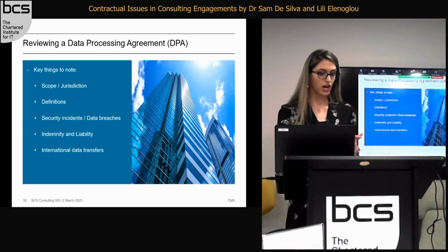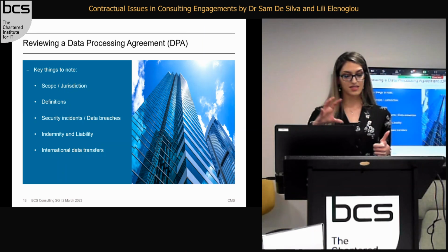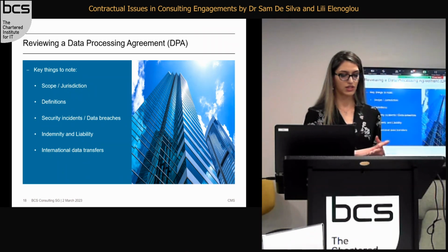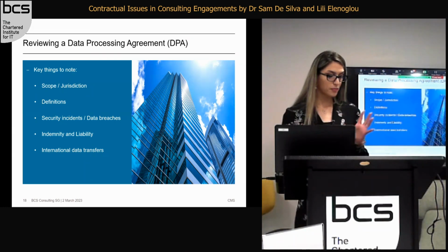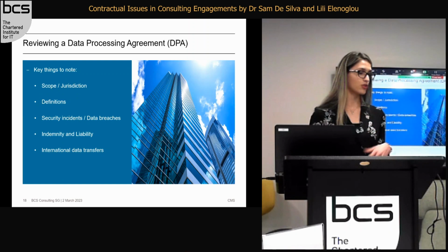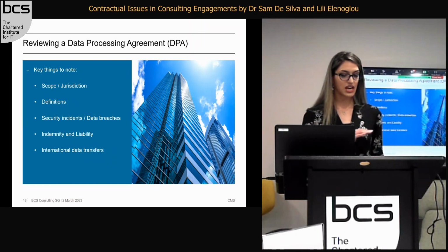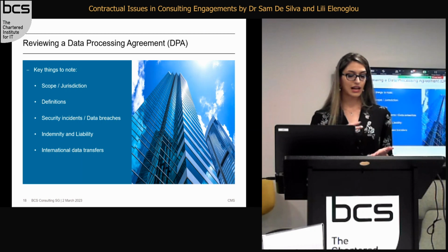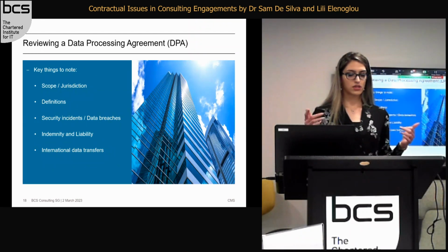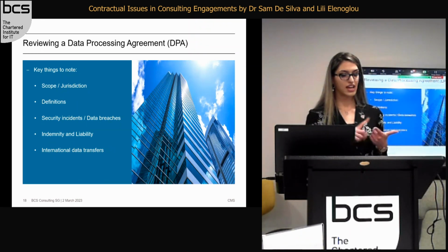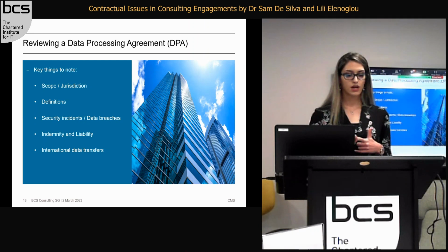First of all, a financial cap on liability, which is different from and separate to the general cap for contractual damages. The amount will depend on the nature of the data, the type of the processing, and the bargaining power, of course, of the parties. And then we also see an exclusion of indirect losses and a list of specific losses which are deemed to be direct and therefore recoverable. This may include, for example, internal additional costs, remediation efforts with data subjects, cost incurred generally in dealing with the fallout from data breaches, etc.